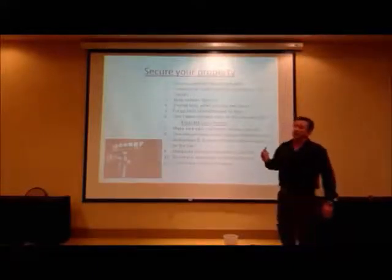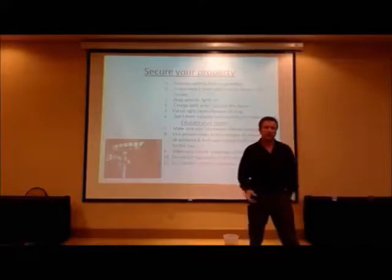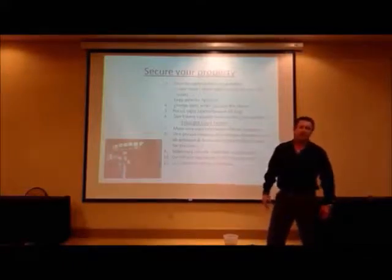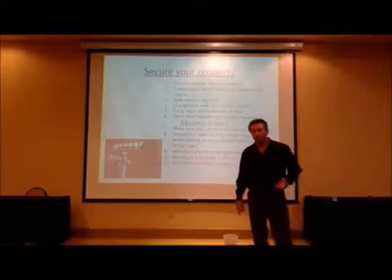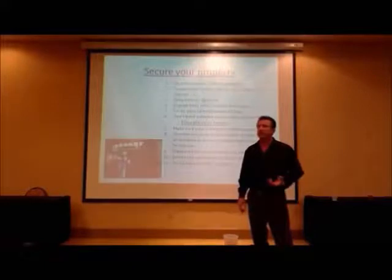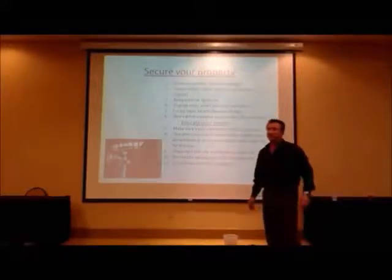And when the project starts, the first week, don't order everything: your appliances, the faucets, the lighting, and it's sitting there for a month while they're working on the house. Number one, they have to work around it, which is a pain in the butt. Number two, you're just asking for somebody to break in and steal all that stuff. I see you shaking your head, it's happening to you. That's a good boom right there. That's a kaboom.